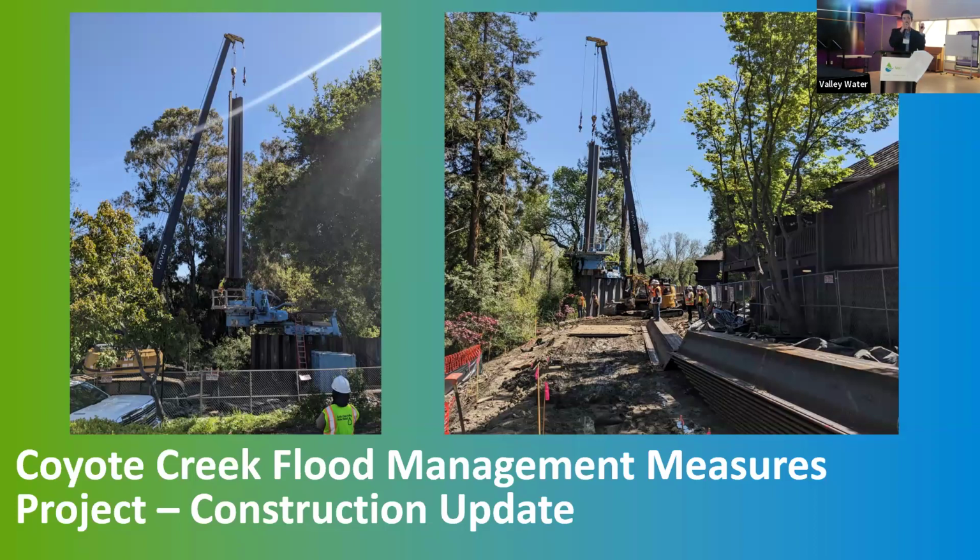So we just need a slim corridor to get the equipment in, and the machine that installs these sheet piles, it's called a silent piler. It's not exactly silent, but it is very quiet. The loudest thing is really the generator powering the machine, but it hydraulically presses the sheet piles into the ground. It doesn't vibrate them or hammer them into the ground.